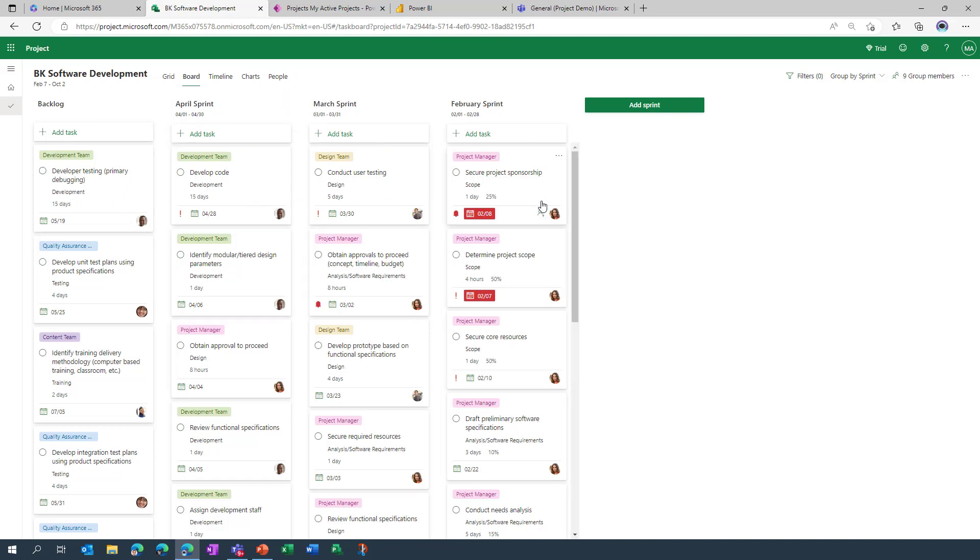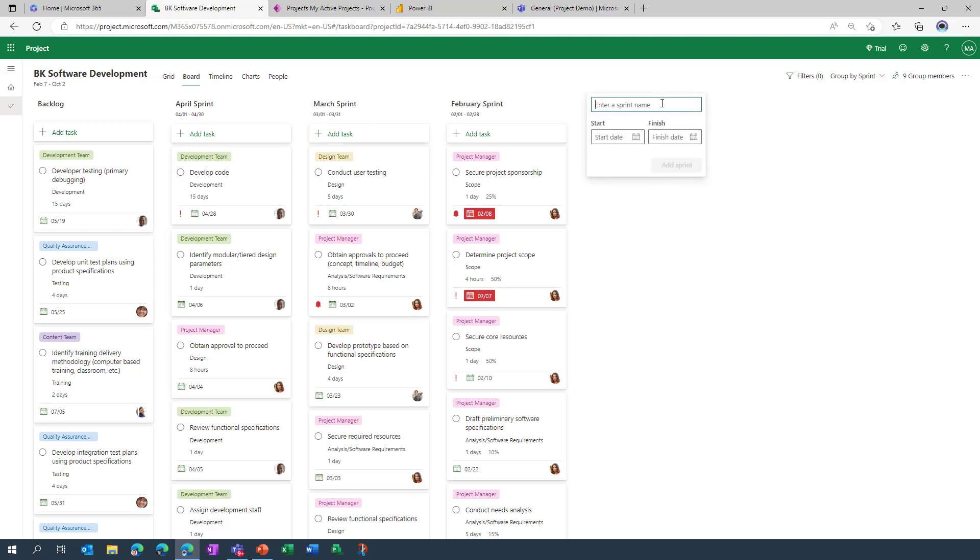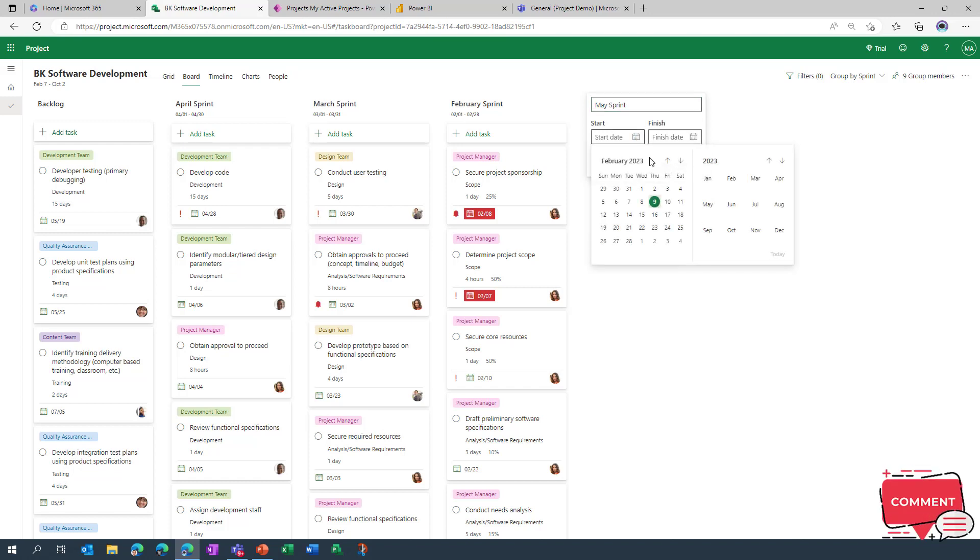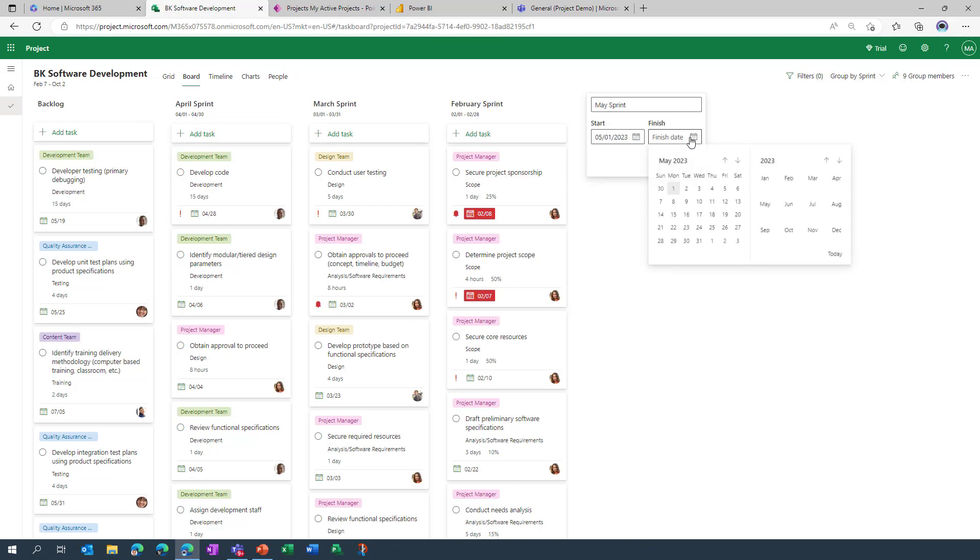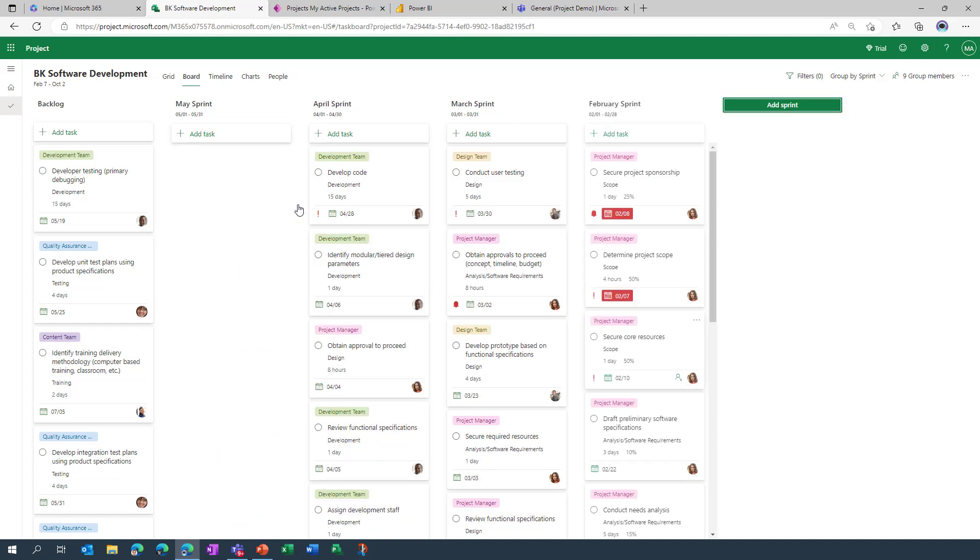But it's really easy to do that. Click on add sprint, let's call this the May sprint, and let's go in and specify the dates. Let's jump forward, put that in, and we'll put the finish date as the last day of May. We'll add the sprint and you'll see that it's going to pop up. And we're not going to populate it only because of the time constraints.